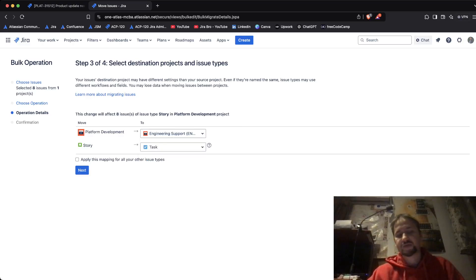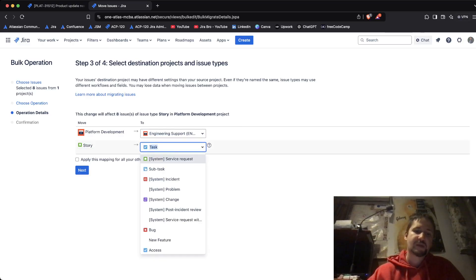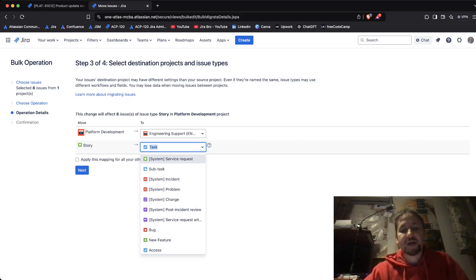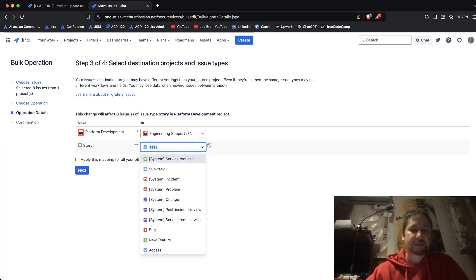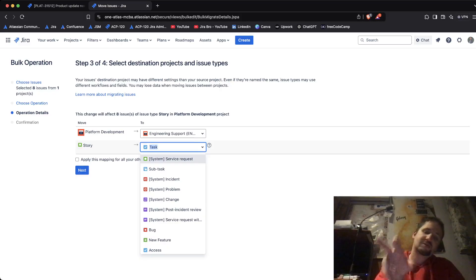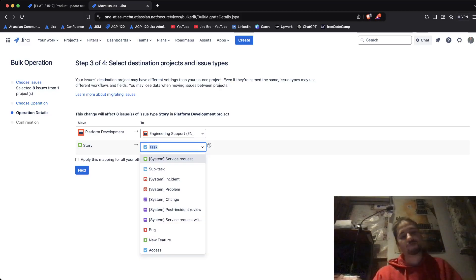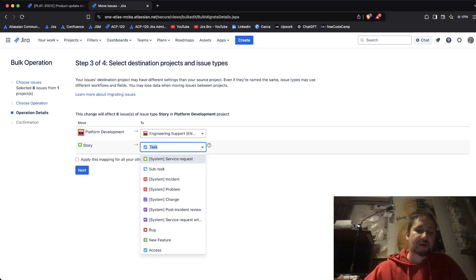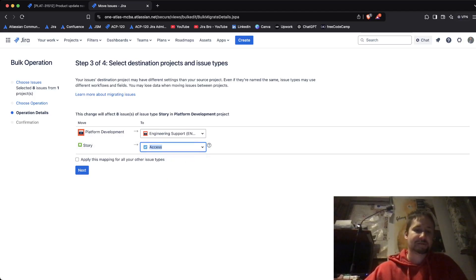I'm going to move this to Engineering Support. These are the issue types available to me — there are more issue types because this is going to be a service management project. The question is can you move between different project types, and the answer is yes — from software to business, from software to service management, and vice versa for all of those project types.